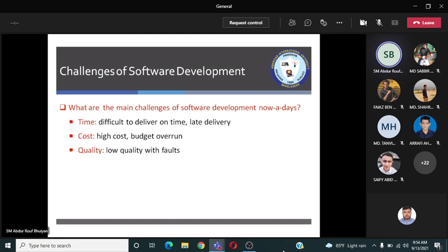That means two-thirds of projects were not successful. So out of 13,522 projects, 82% were delivered late, and 43% exceeded budget. So that is a fact. From different survey results, we see that all projects are not successful.